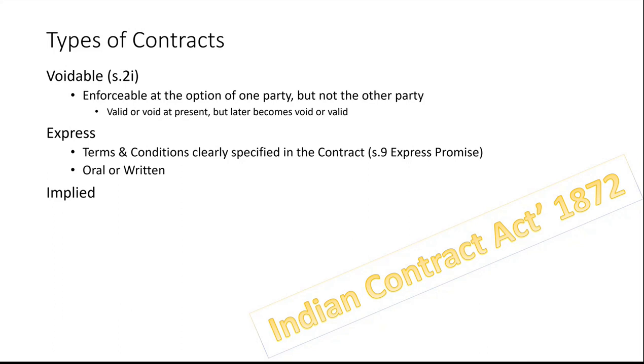Say, price is all inclusive. Simple example. Accounts, finance, administration, tell me. Price is all inclusive means the party who is giving service has to take care of supply, transportation, taxation, everything. So all inclusive you have written. Is it express or implied? Implied. Price is all inclusive is express. But whether I need to pay tax, the reply to this question is implied.